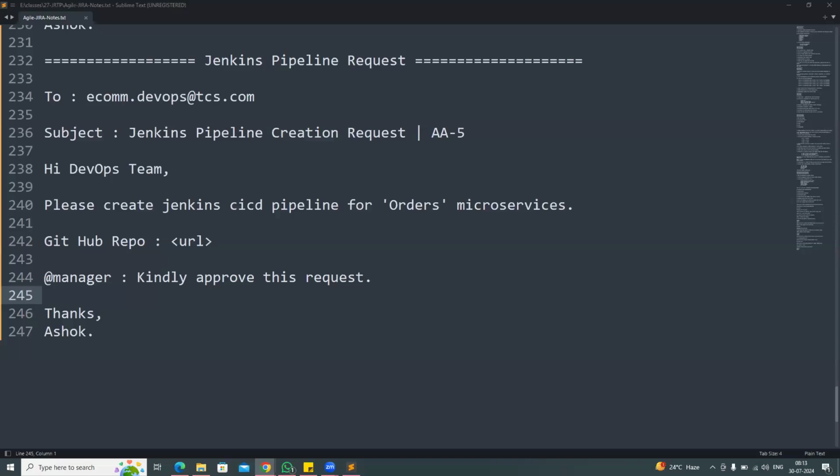So they have given 3 days of time to complete your story, but actually it is taking more than 3 days. Then you can tell the Scrum Master, I'm working on story number 422. This story is targeted for 3 days, but actually it is taking more than 3 days. What is the reason? You need to update that in the Scrum call. Why is it taking more time? What is the actual reason? If you need more time, then you need to justify that.